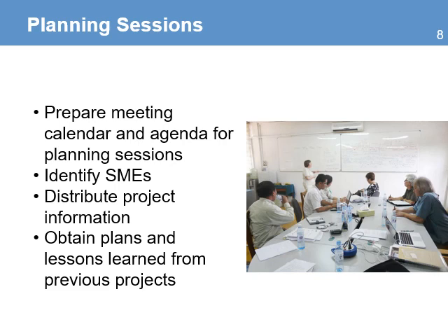You need to distribute some of the project information to the participants so they can become familiar before the session starts, so you don't waste too much time during the planning session explaining what the project is. You also need to obtain plans and lessons learned from previous projects that can be used as a reference during these sessions. This is information the team could look at for examples of what successful projects did to develop management plans.